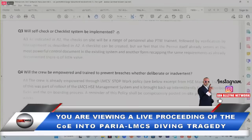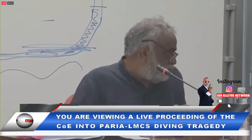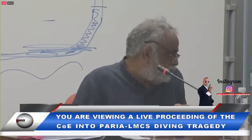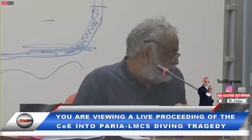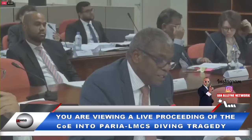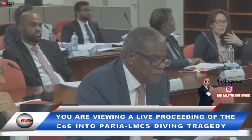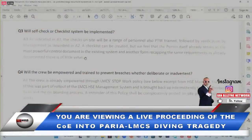It's supposed to be on the front page. Question 3. You see Q3 and you see A3. A is the answer, Q3 is the question. But I could help you quickly. What your Mr. Ali was confirming to Paria is that a checklist can be created, because Paria was suggesting a checklist as a method of guarding against infractions, whether that system is going to be implemented. And your Mr. Ali, Paria's LMCS Mr. Ali, said a checklist can be created, but we feel that the permit itself already serves as the most powerful control document in the existing system, and another form recapping the same requirements as already documented is of little value.